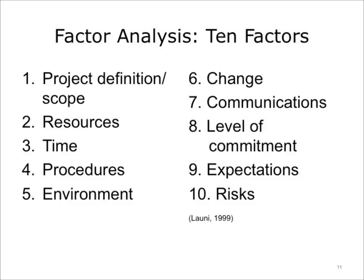When performing a factor analysis, there are at least 10 areas you should consider. First, definition and scope: understanding the project's primary purpose as well as listing all of the major functions and deliverables expected to complete the project is very important. Likewise, determining why the project was created and what mission it fulfills within the organization is crucial for determining the project's overall relevance and support. Resources: a factor analysis attempts to identify all of the necessary resources needed for the project's success, including monetary, technical, personnel, or special materials needed. Time: you should calculate the actual work time needed to complete the project as well as the overall timeline.